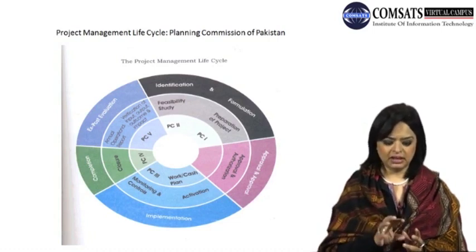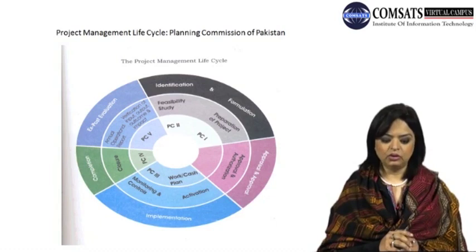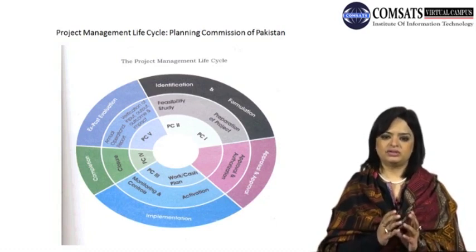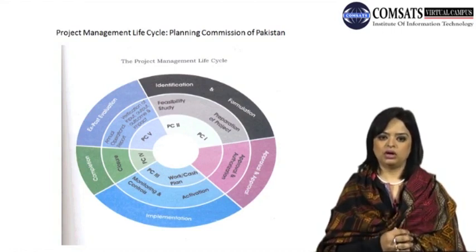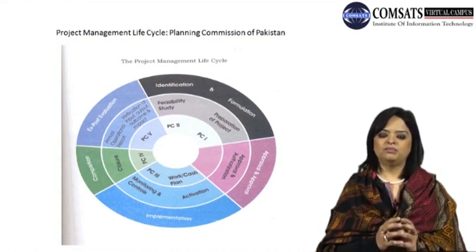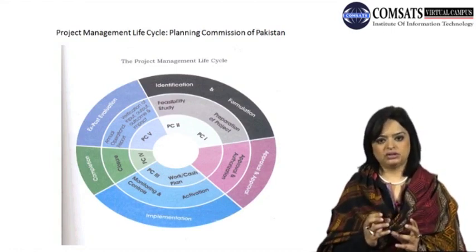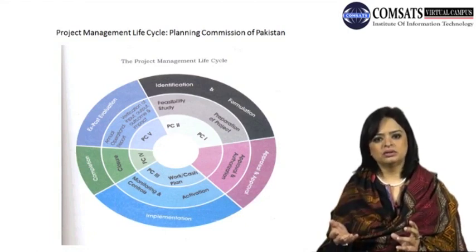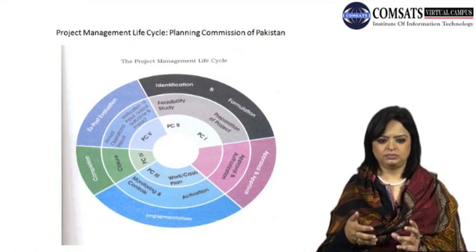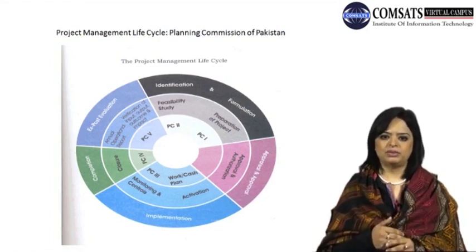For the Planning Commission of Pakistan, there's a PC5, which is the annual operational report, verification of input, output, outcome and impact. So there is a phase given to your project or a program where some verification is going on, whether the intent of the project is met or not, or does it have end user acceptance. All that to some extent should be done in the project closure phases.